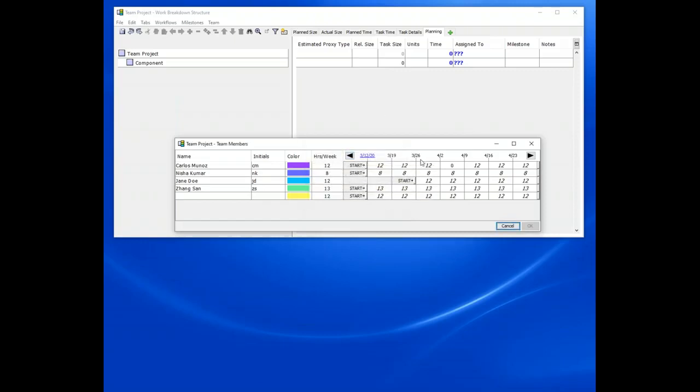And then once you've done that, the table in this window makes it pretty straightforward to enter the list of team members and their calendar of availability. The columns on this table display weekly periods that start and end on the weekday you selected. And of course, there's a separate row for each team member. You can enter hours per week and exceptions, etc.